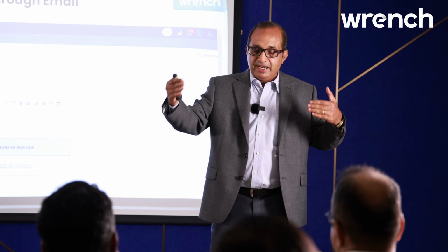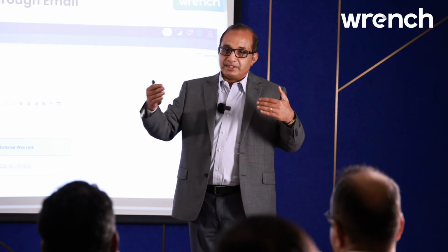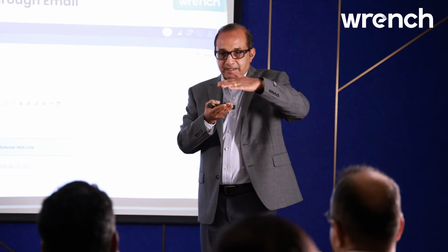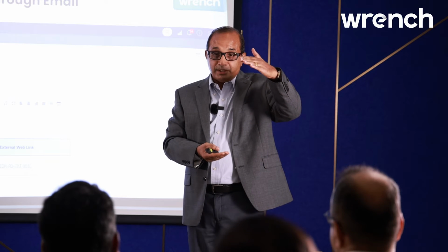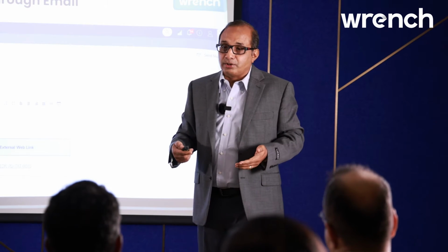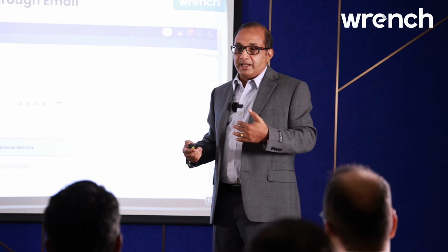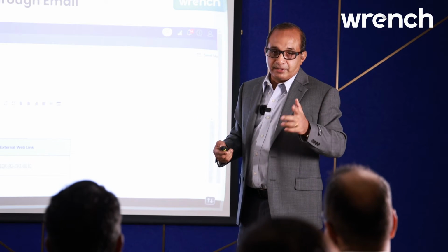Now, you can send reminders to the client that in 5 days or 10 days, you're supposed to send back my comments, and I haven't received them. You can give them a list of drawings outstanding from them. And this makes sure that you expedite the client automatically to get the feedback, so that you can get the drawing completed and released.